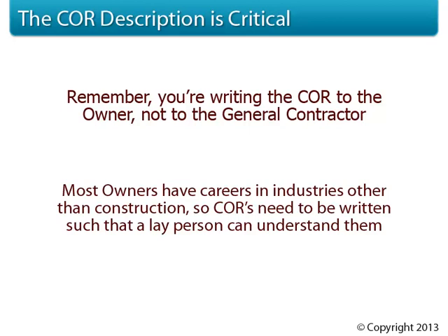Most owners have careers in industries other than construction, so change order requests need to be written such that a layperson can understand them. A lot of owners have never built a building before, especially in the private commercial sector. These owners may hire construction managers to manage the project and look out for their best interest, but the one thing these owners are still going to keep their hands on are their wallets. All owners, even if they've hired a CM to look out for them, will still review and approve change order requests personally. This means that we need to explain the issues in a manner that they can understand, even if this is their very first construction project.